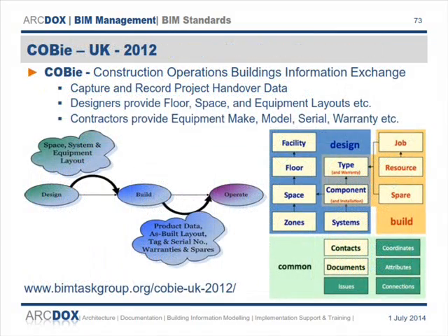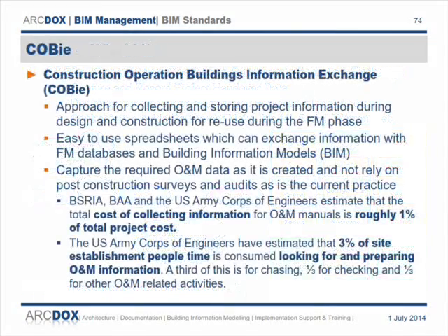And again, it's split down, as I said earlier, into the designers providing some basic information at the beginning on the floors, the spaces, the equipment, the layouts, and the contractor then adds additional information to that as the project progresses. So you're not putting everything in at the beginning, and you collect all of that information. And it's a structured approach to how that information should be delivered in an Excel format.